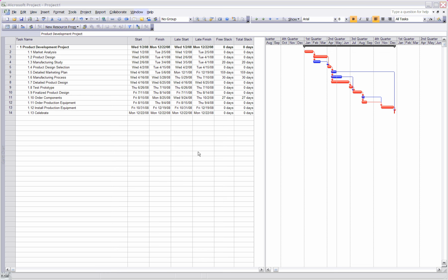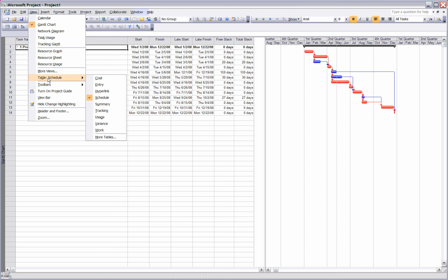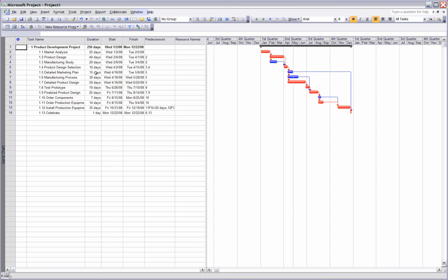So in our last video, we entered all of the information that we needed to for BlueZuma Part 1. And now we're just going to real quickly go over the questions asked in the assignment. The first question is when the project is estimated to be completed and how long it will take. And as we can see here, if we go into a different view quick, the project is expected to be 250 working days. It's going to start on January 2nd and end December 22nd of the same year.